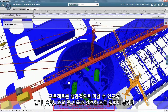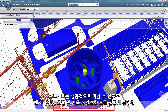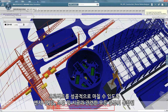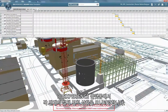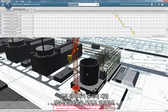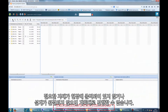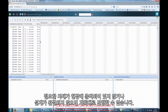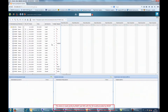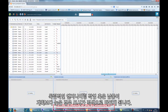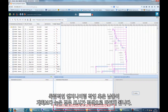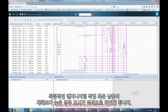In order to achieve project excellence, the actual progress of each phase is monitored within the 3DEXPERIENCE platform, where all schedules across engineering, procurement and construction are integrated. If you are a construction manager, you have your plan for each of your construction tasks, but you won't be able to execute it if required materials are not ready at the site or the design is not finalized. In the unified schedule, you can see all those dependencies visually. For your construction tasks, if any dependent engineering or procurement tasks are behind schedule, you will see the markers turn red.